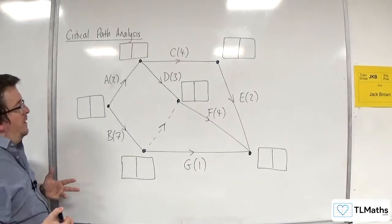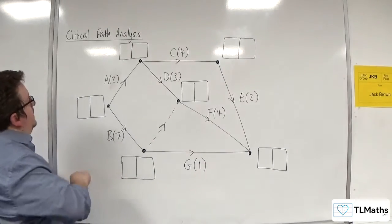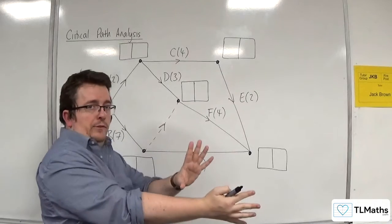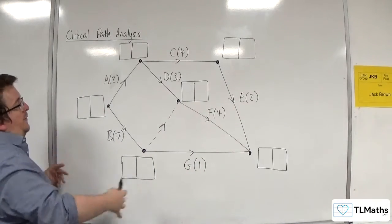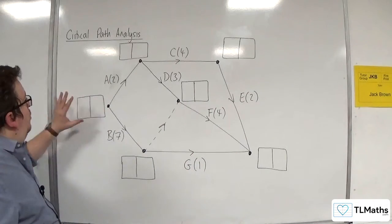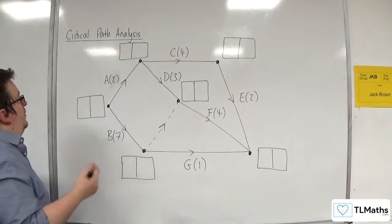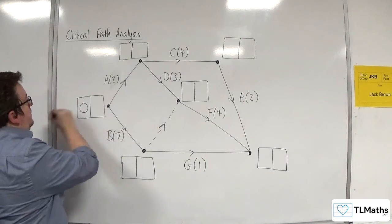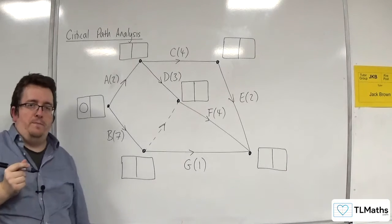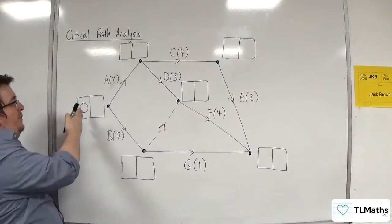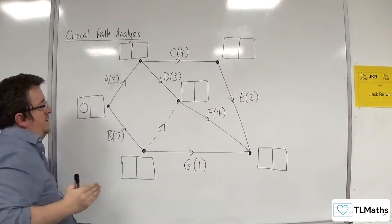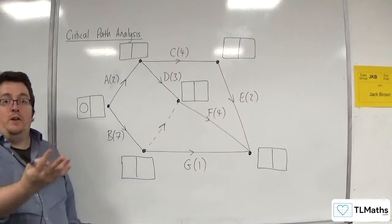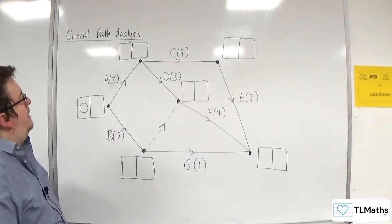That's what we want to do. So what we do first of all is what's referred to as the forward pass. The forward pass allows us to fill in all of the left hand boxes. So we're going to start off here at the source, and we start off with zero. Now, we start off with zero because at this event, the earliest time we can start there is at zero. Zero time has elapsed.